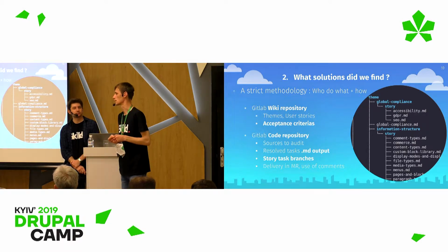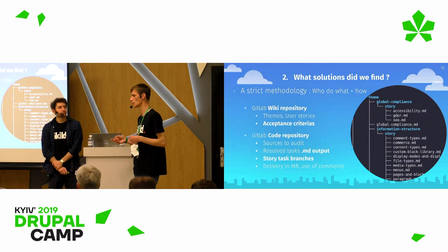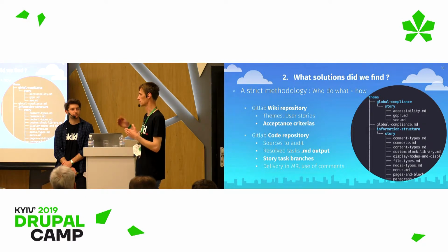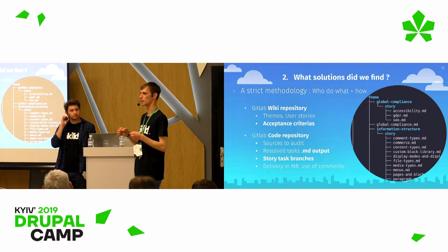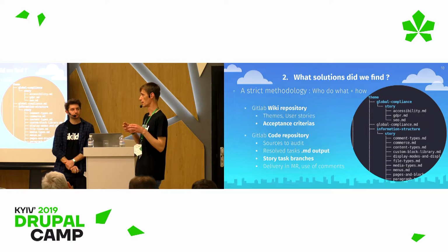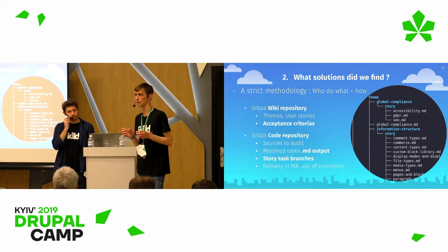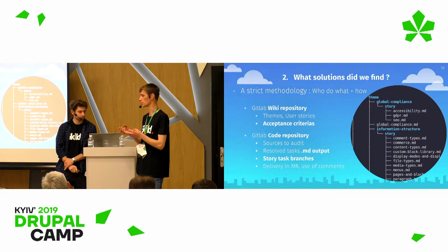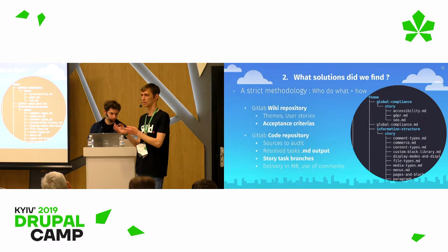And the last thing, when we transferred this mind map into GitLab issues, speaking about acceptance criteria, we divided all these topics into smaller ones. For a small topic, you may easily define acceptance criteria. So it means that we try to take a look at common things and detect possible mess inside common things before we get the whole picture for the project.